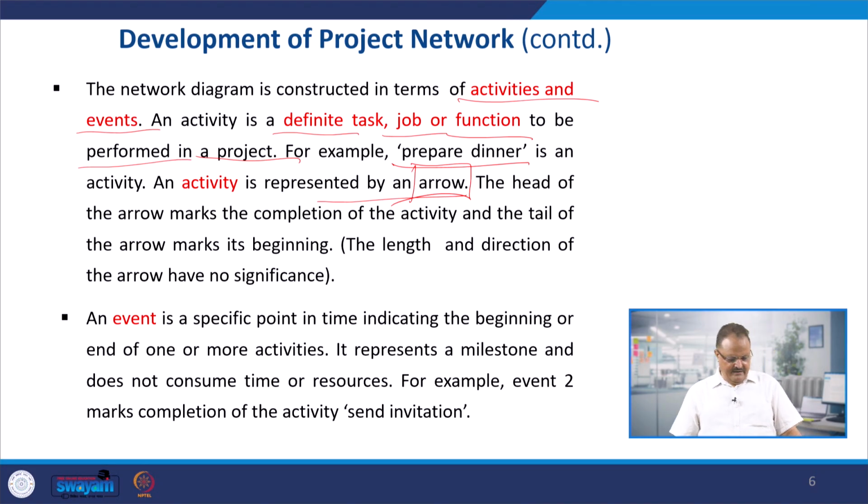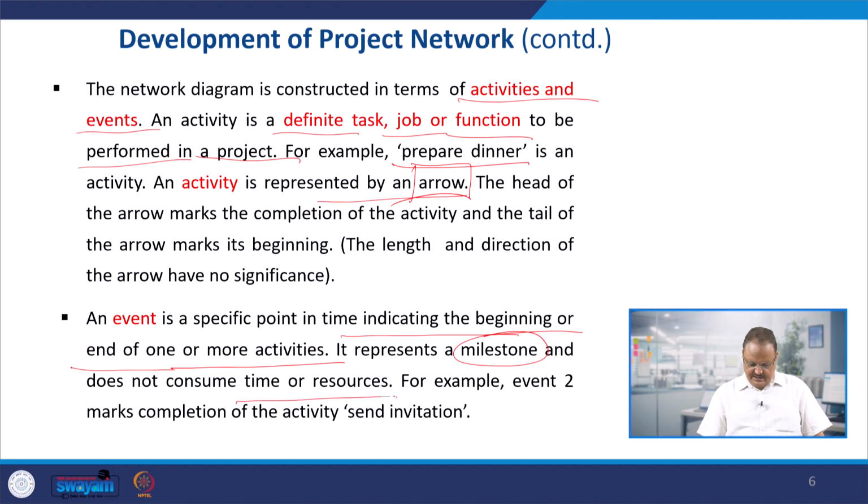And similarly, an event is a specific point in time indicating the beginning or the end of one or more activities, right? It represents a milestone, meaning the happening of something, and does not consume time and resources. It doesn't consume any kind of resources. It's only marking the milestone or happening of something.